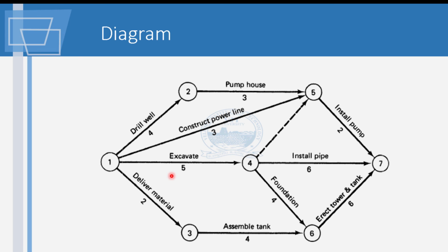construction or formulation. Okay, so you can also put everything on the node. So you can put late start, early start, and early finish, late finish, and also the duration with the activity description on this node. Okay, that's the precedence diagram, which we can also use. So once we get that in place, you will get the same result, but it's a different formulation.